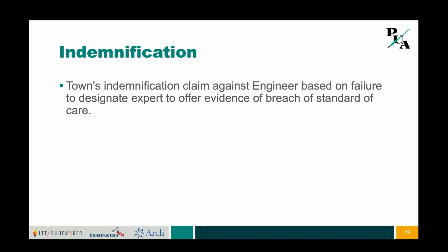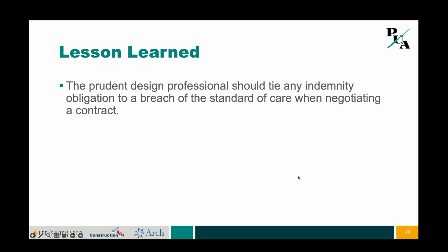What's the lesson to be learned? Well, we recommend always tying any negligence duties that you assume by contract to a breach of the standard of care so that it's aligned with your professional liability insurance. There's a boatload of other pitfalls that can arise with an indemnification provision, but if you're starting off with tying an indemnification obligation to a breach of the standard of care, you're going in the right direction.